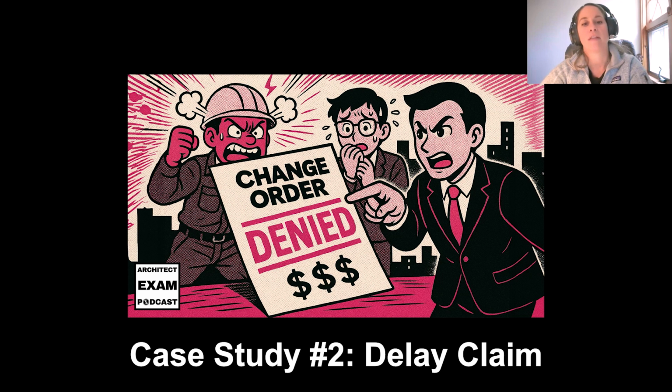So the key takeaway of this case study was that there was value in the thorough documentation that the contractor provided to the owner because of the delay that was experienced. And the contractor was really good about being timely with notifying the owner. And there were a lot of benefits to this. The proposed solutions were a very proactive approach rather than just being delayed and then getting to that 45-day delay and saying, hey, sorry, it rained and the steel's not on site, your project's delayed. The contractor was really good about getting ahead of it, being very clear and transparent and doing those projections and sharing it with the owner of the project early on so they knew what they were getting themselves into.